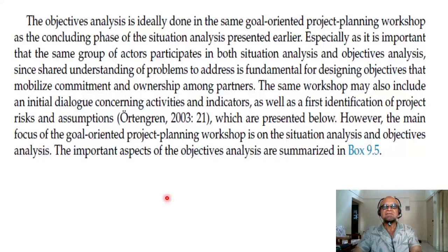The objectives analysis is ideally done in the same goal-oriented project planning workshop as the concluding phase of the situation analysis presented earlier, especially as it is important that the same group of actors participates in both situation analysis and objectives analysis, since shared understanding of problems to address is fundamental for designing objectives that mobilize commitment and ownership among partners.